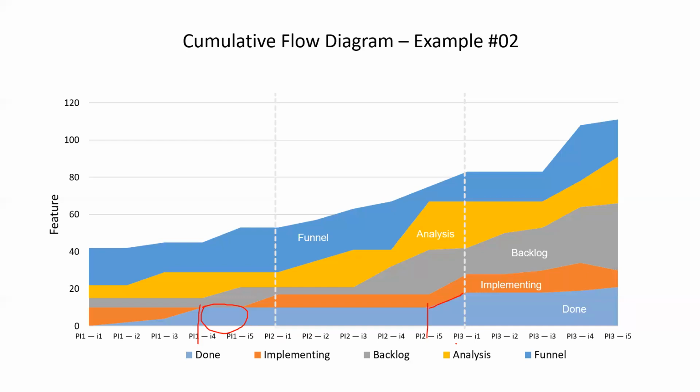Right? Satish, one question, sorry. Yes, sure. That flat line between implementing and done, does it mean the team is continuously working on stories and simply rolling them over to the next sprint? Is that what is exactly happening? Okay. Exactly. The team is not completing, or they might be completing, but the stories might not be moved to the done state for various reasons.